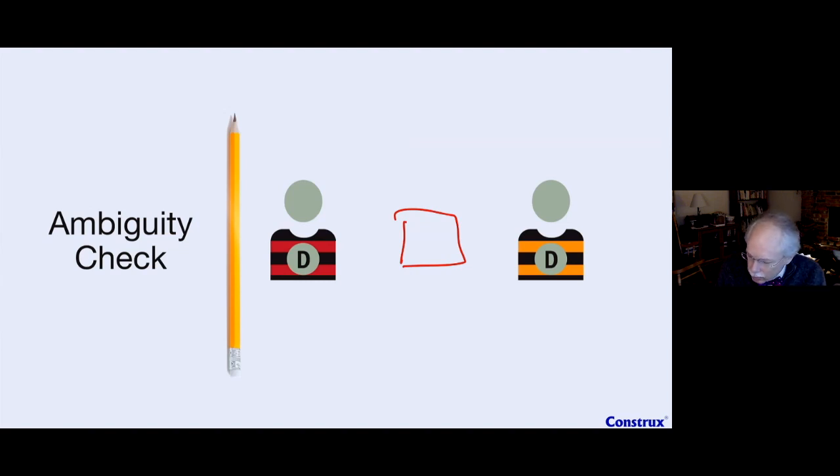So this developer will look at the box and say, oh, I think that's 13 story points or something. And that other developer looking independently at the box would say, I think that's 2 story points. Well, right away, we can tell that these two people do not see this work in the same way. One sees it as a whole bunch of work, and one sees it as a trivial amount of work, which means we need to have a discussion between these two to start thinking about, tell me why you think it's only that much work.